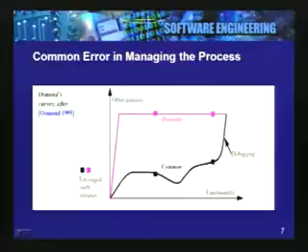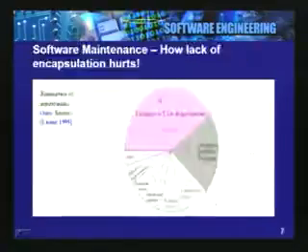So a lot of the code was added without adequate testing getting done, without adequate attention being paid to performance, to ease of use, to structural integrity of the software and so on. And then most of the debugging took place in the last phase. Whereas what is actually desired is something that will set up the quality framework very early in the process, and then you add the functionality as you go along, and you can make the same releases with the same amount of functionality, but you'll have a lot more quality to it, and that's the desired process.